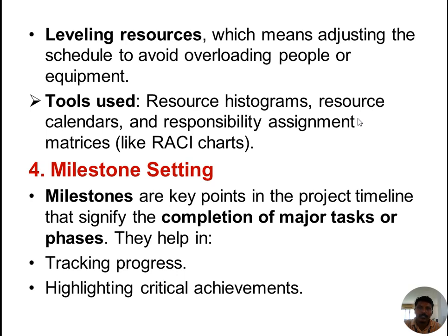Then what are the tools used for resource allocation? Resource histograms, resource calendars and responsibility assignment matrices like RACI charts are helpful for resource allocation. What resources are available and what resources are required to complete the project are all identified with the help of RACI charts.